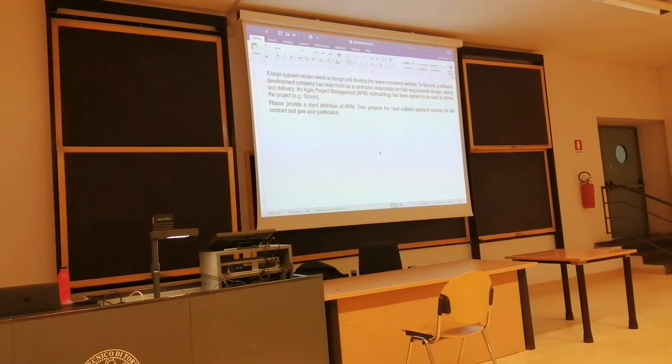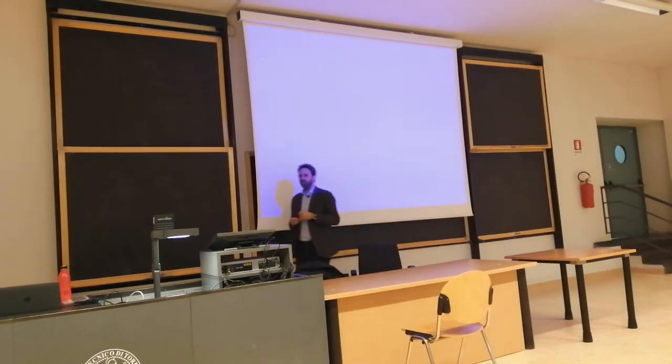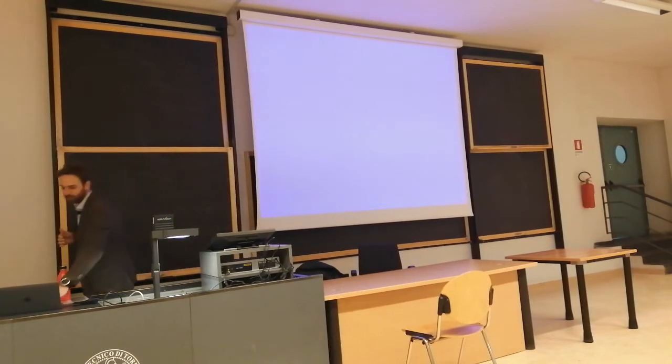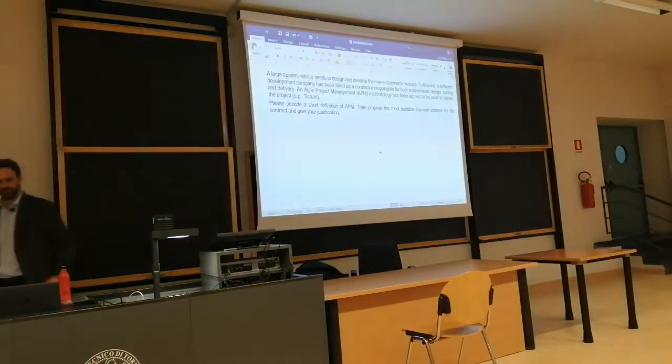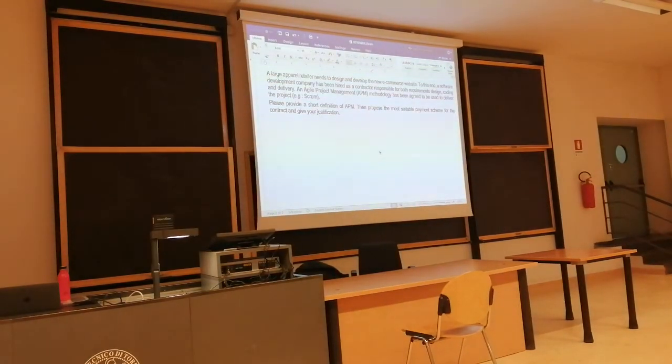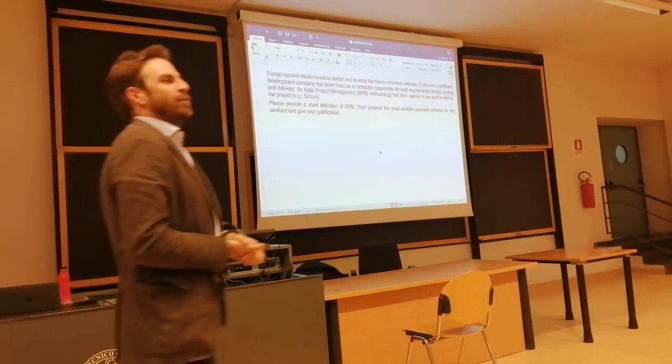If you've set up for a firm fixed price, some of the could have requirements will never be delivered. And maybe some of the should have won't be delivered. The must is the must. So maybe a firm fixed price is not the best solution. Vice versa, on the contrary, cost plus a person fee. Would it work? The project will never end.